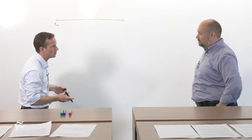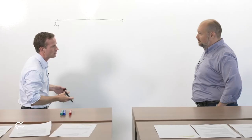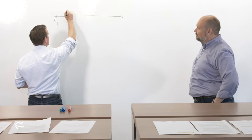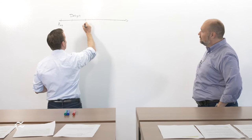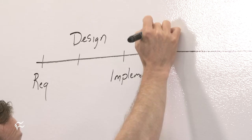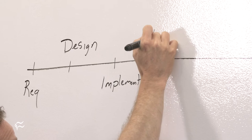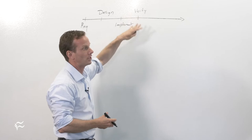And it really had five different steps. So, we have time right here. And the first thing you do is you go out and you gather a bunch of requirements. What is the business objective that you're trying to achieve? Then you enter a design phase. This is where you're thinking about what are the different components, how do we break it up, how do we start divvying it up into teams, and so on. And then you get to an implementation phase. So, you have all your developers who are building the app. And, of course, because you want to double-check their work, you're going to have a verification step. And really what this meant originally was you want to verify the implementation meets the requirements. What happened over time as security evolved is people started throwing in security. You've got to verify it's safe there. And then you enter in this maintenance phase.